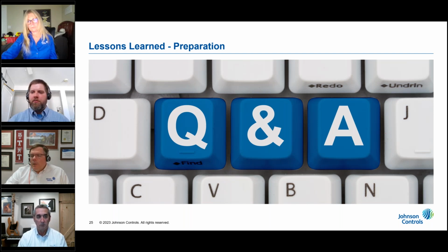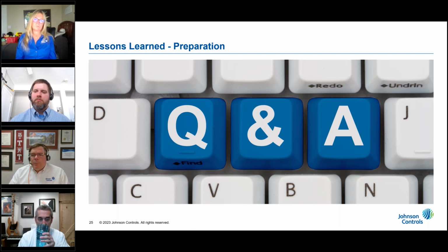Craig, I see one here came through. It's what is meant by performance contracting for AMI? All right. Performance contracting means that a service provider will create a baseline of your existing utility performance and then develop a series of improvement measures that will generate additional revenues for the utility or will reduce operational and maintenance expenses. And those increases in revenue and decreases in expenses will be used to pay for the project over a period of time. And the benefits have to be measured and guaranteed. And if the company offering the performance contract doesn't meet those projected benefits, then they must make up the difference.